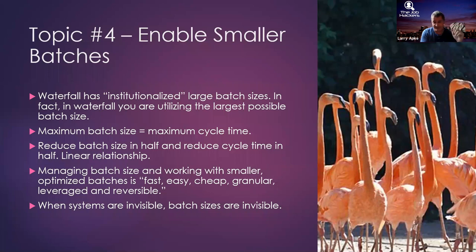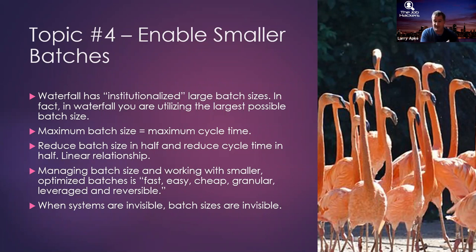Managing batch size has several characteristics: it's fast — if I have a batch size of 10 and I want to change it to five, that's a pretty easy and fast decision. It's cheap — it doesn't cost much to change batch sizes in most cases. It's granular — I could change it to five, six, or seven. It's leveraged in the sense that changing batch size will change cycle time. And it's reversible — if I go from 10 to five and find that somewhere in between is optimal, I can go back.